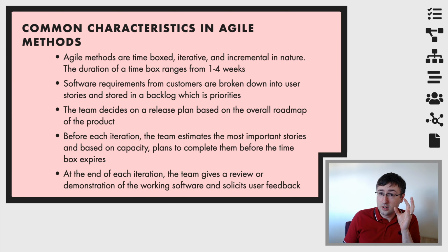We take our customer's software requirements and we break them down into something that's called user stories. We're going to cover user stories in a lot of depth in this module because they're a very good way of actually trying to understand why a particular requirement gives value and who it gives value to. These user stories are prioritized, and like we do with most of our requirement specifications, we figure out which ones are the most important and the order in which we're going to be working on these.